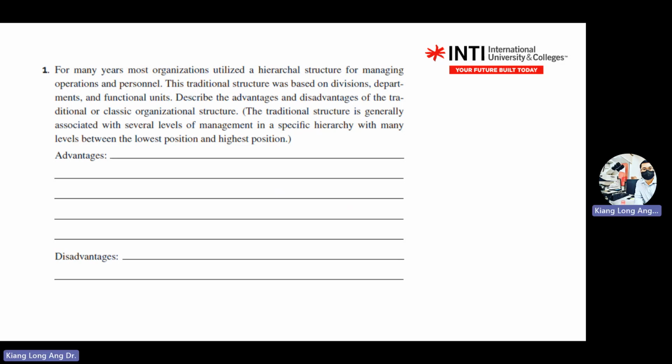Okay. So the disadvantages we just mentioned: coordination is difficult, the influence of the strongest functional group, no specific responsibilities, and responding to customers is very slow. We talked about loyalty. Functional loyalty will be stronger than project loyalty, meaning you are loyal to your own functional unit rather than to the projects.